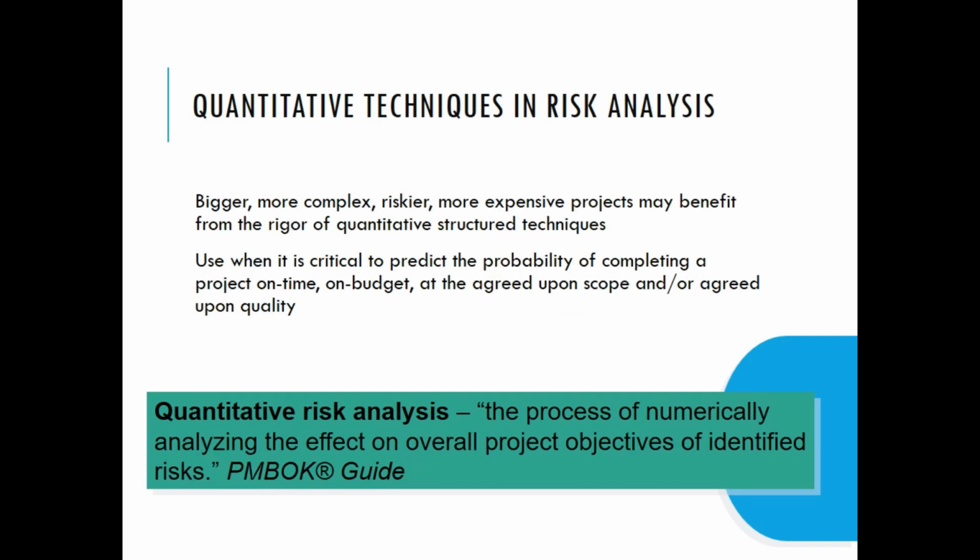Bigger, more complex, riskier and more expensive projects may benefit from the rigor of quantitative structured techniques. Use quantitative techniques when it is critical to predict the probability of completing a project on time, on budget, at the agreed upon scope and agreed upon quality. Quantitative risk analysis is the process of numerically analyzing the effect on overall project objectives of identified risk.